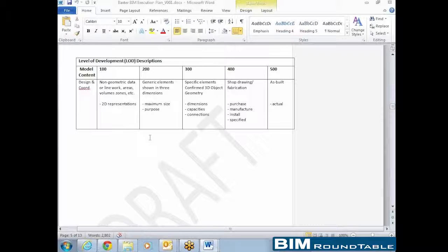We went through that exercise where we had all the disciplines in a room, and asked, okay, what do you need at a certain point? We'll write it down. What do you expect to give at a certain point? We'll write it down, and then we start to filter it in and go, oh, okay, this is not going to work. Really, we do that, and then try to capture that in. Right. And sometimes that leads to adding additional rows.